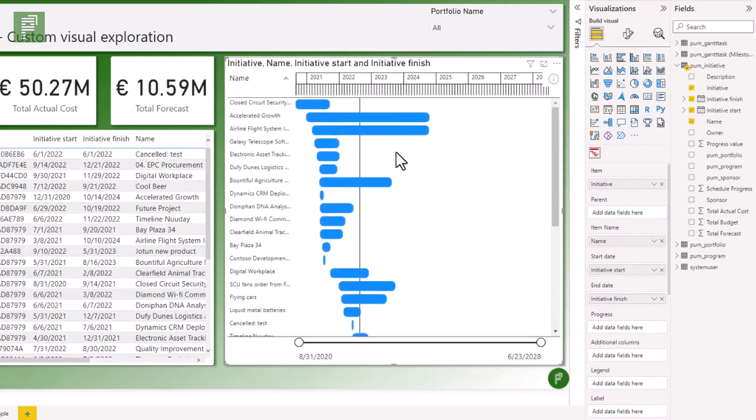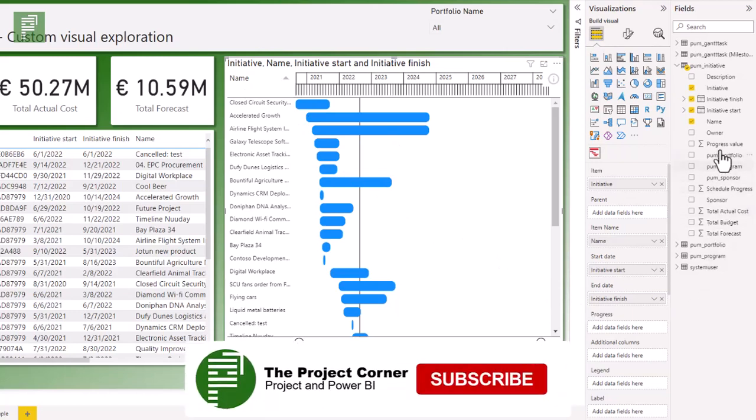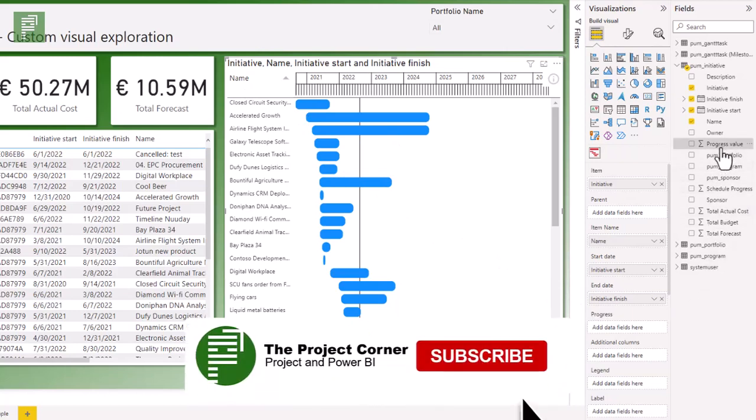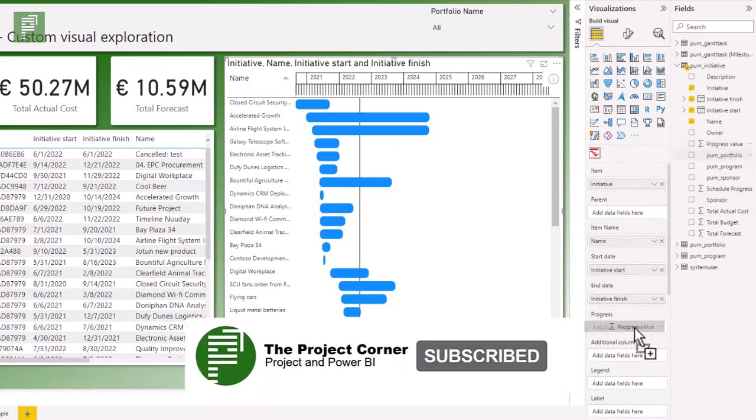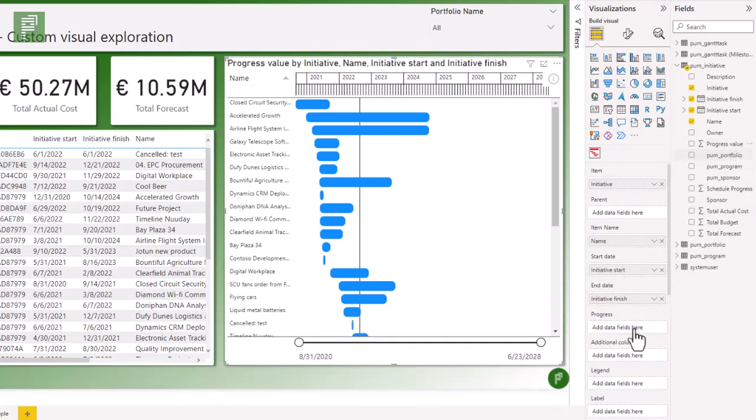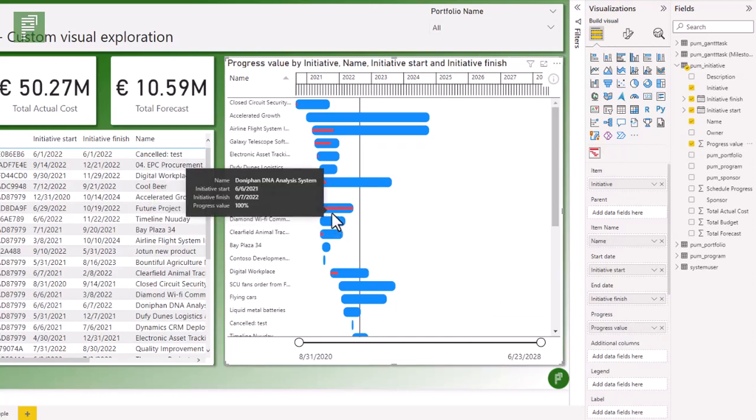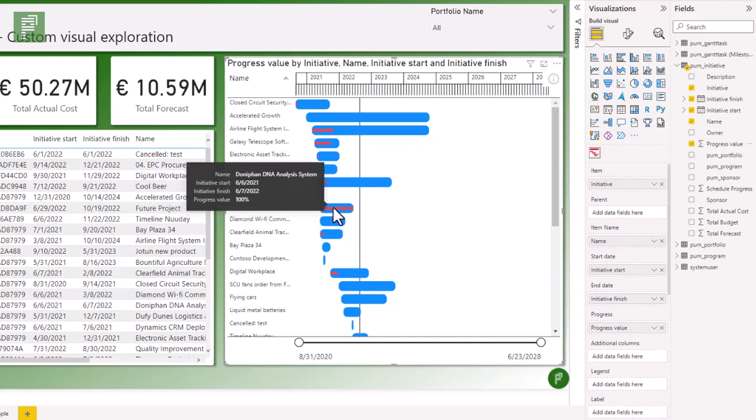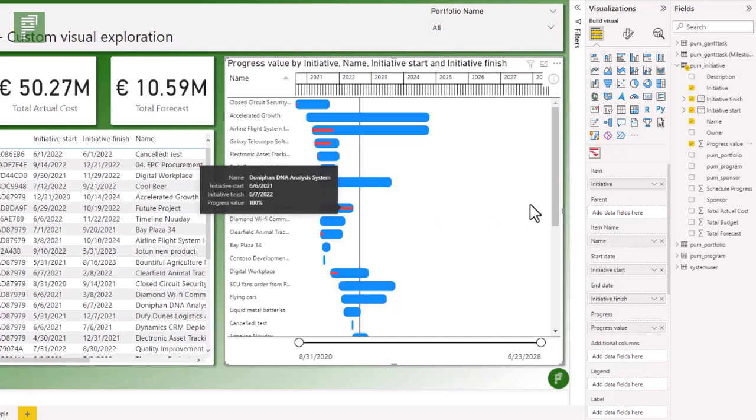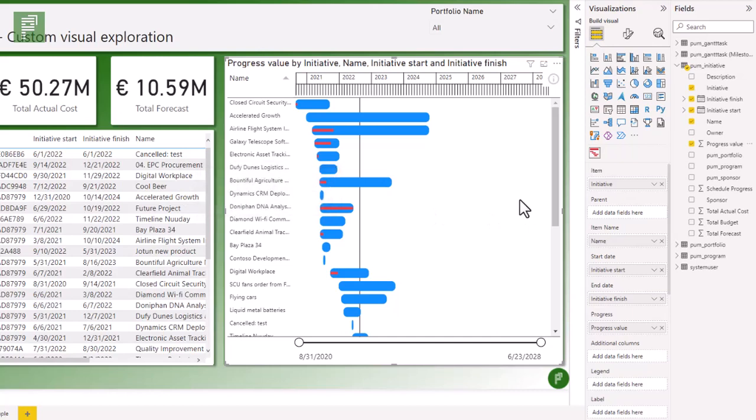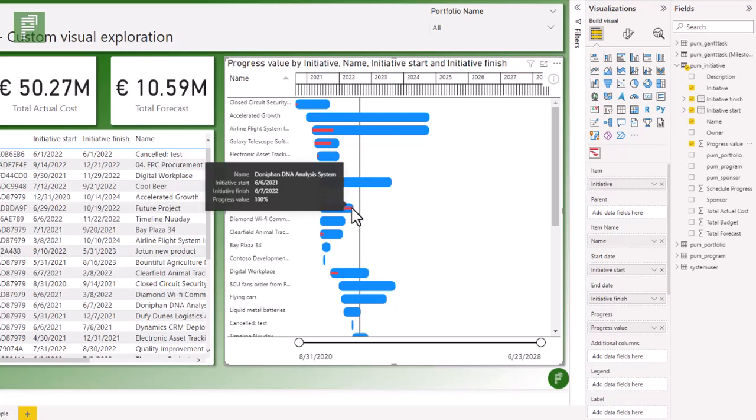Let's see what we can do to increase what we're seeing here. So for progress, we have a progress value. Make sure that this is a percentage value, otherwise you'll get very strange numbers, very strange bars because I had 100 as a normal number and it just went all the way out of the visual. So here you have the color which you can also of course change.